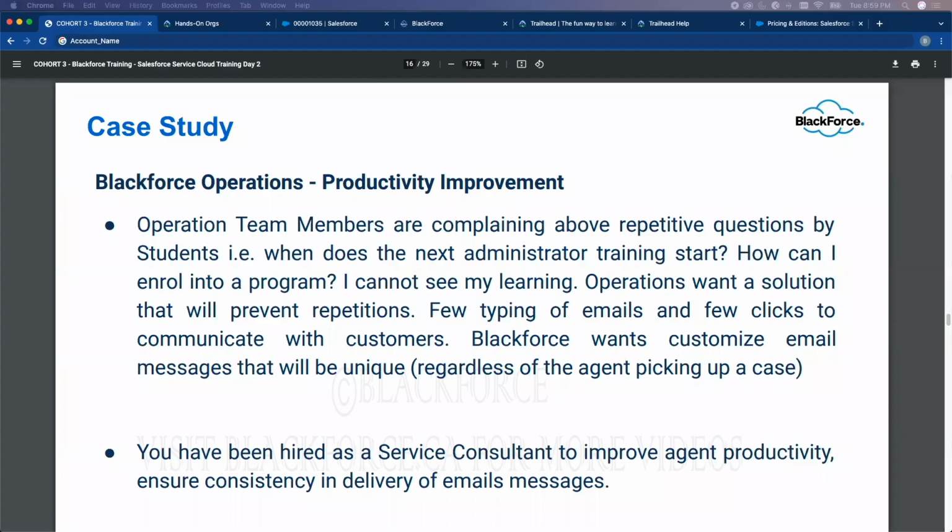It depends on the organization. If you're working with a smaller organization, they don't have the luxury of creating QA environments, SIT environment, and UAT environment. So it depends on how big the organization is. However, what you need to do is move into dev, whereby all your developers get the code in one place. After that, you move into QA. QA will test the solution, ensure everything works fine. After QA approves the solution, you go to UAT.